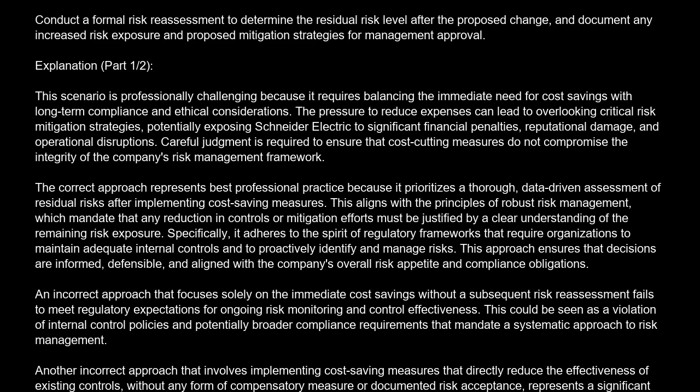The correct answer is B. Conduct a formal risk reassessment to determine the residual risk level after the proposed change, and document any increased risk exposure and proposed mitigation strategies for management approval.